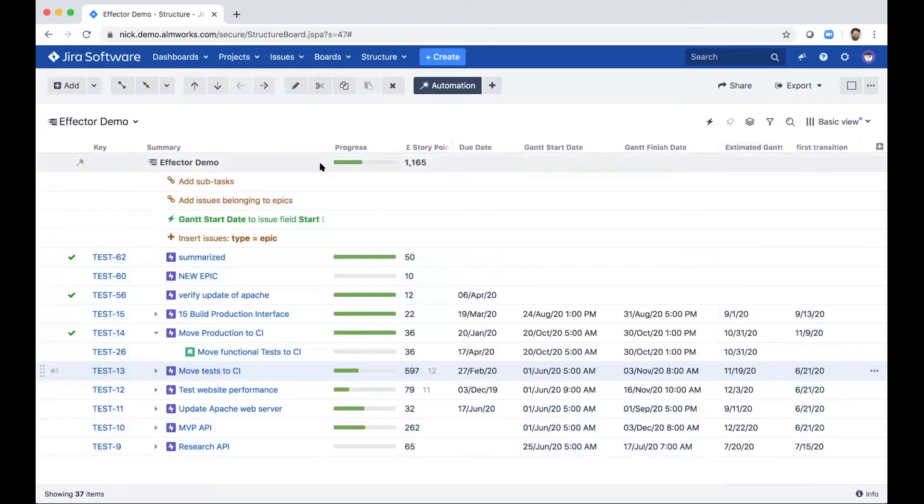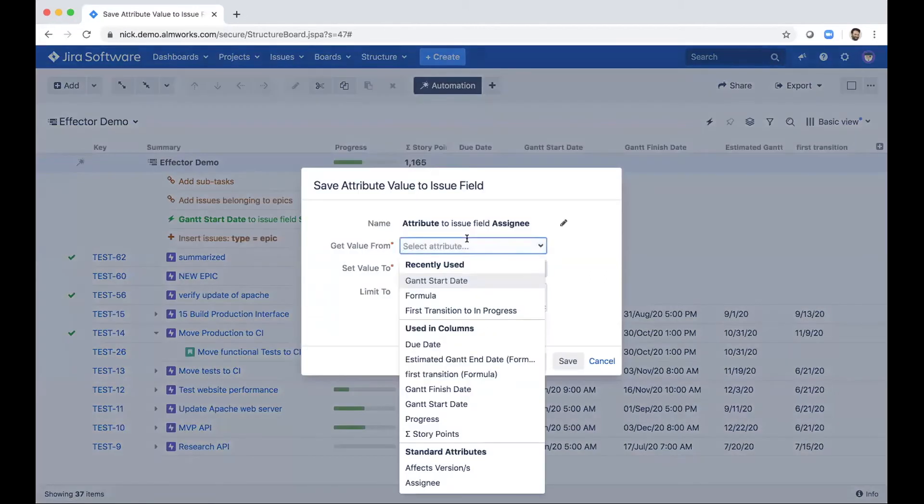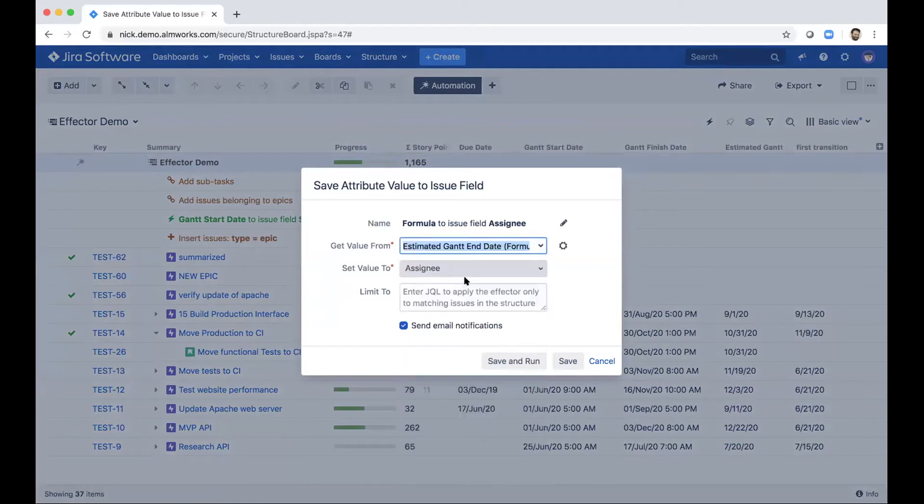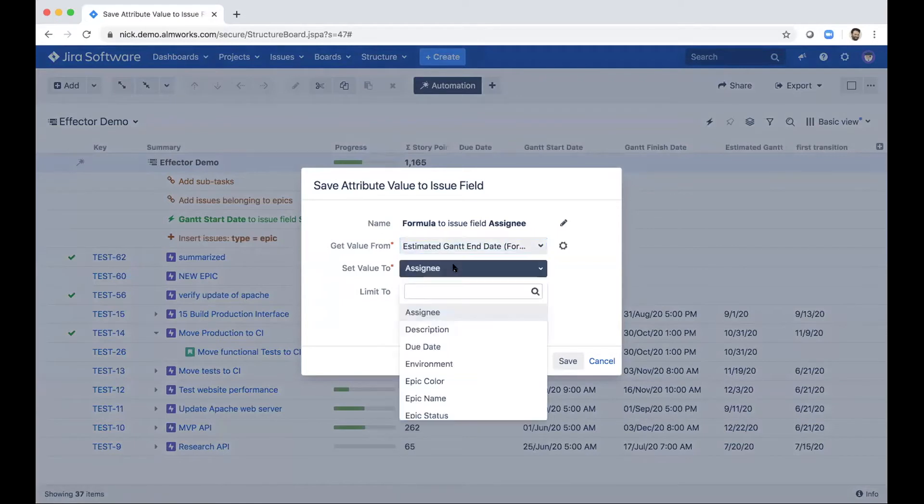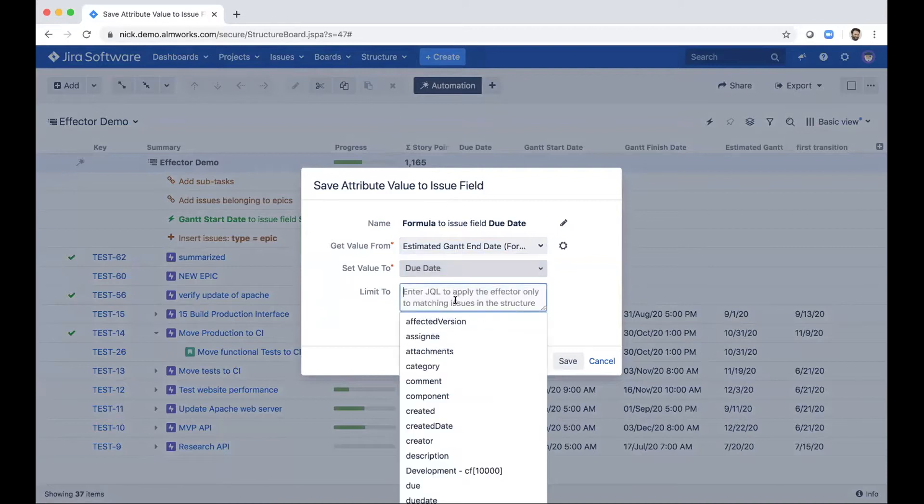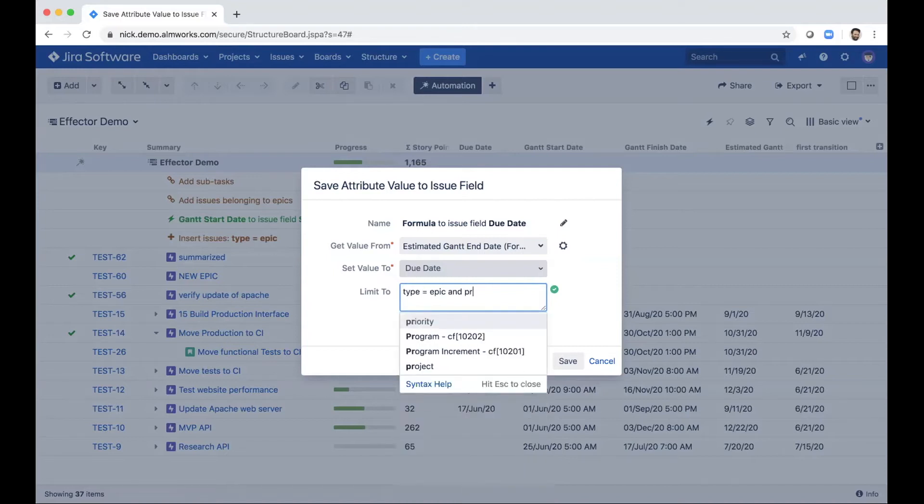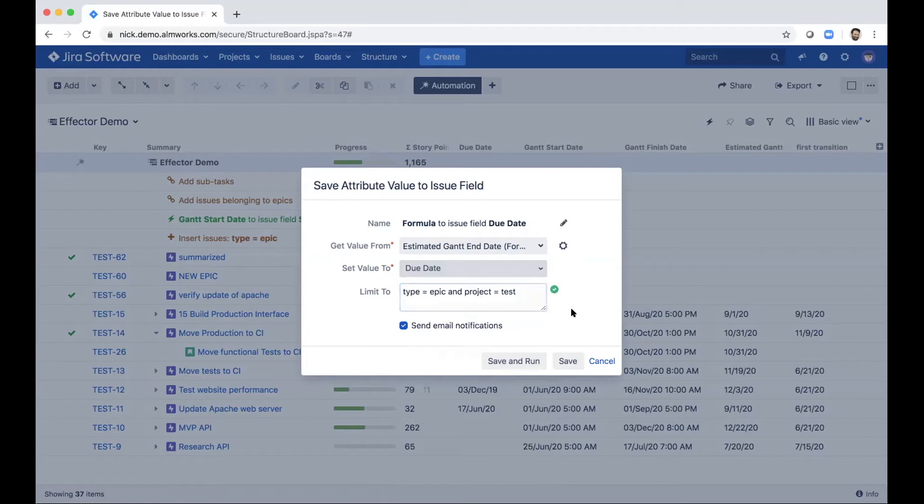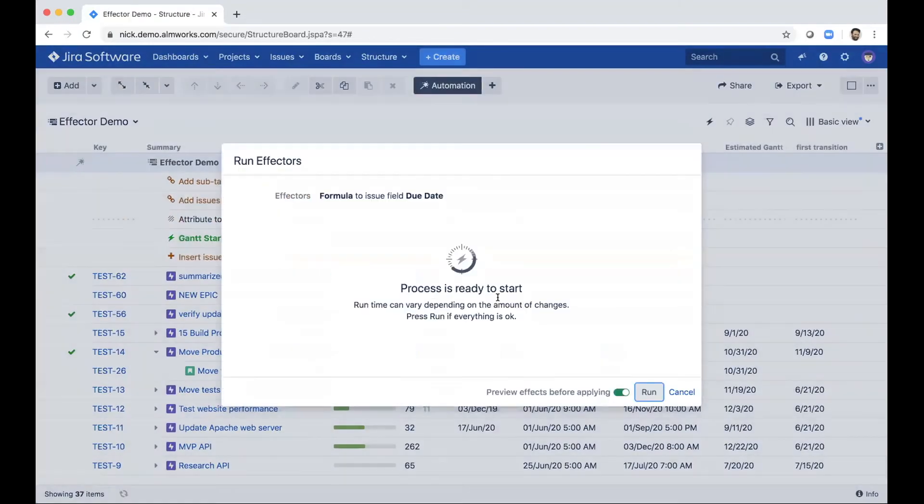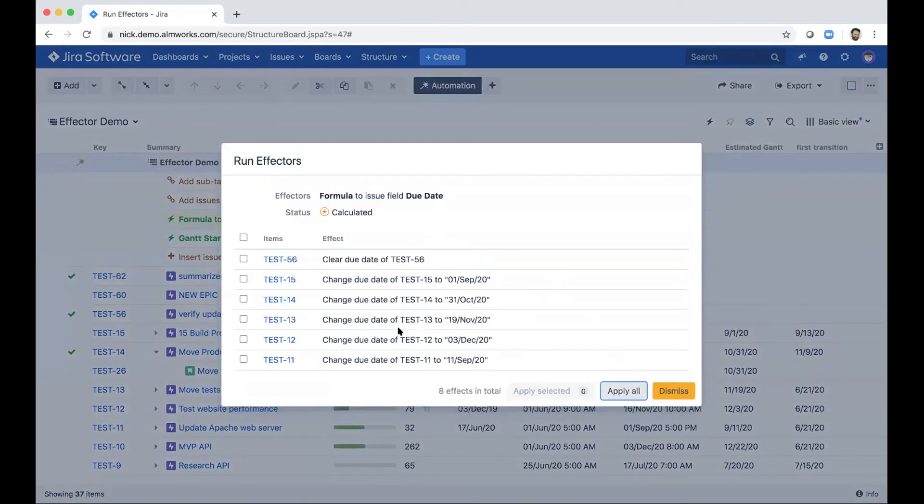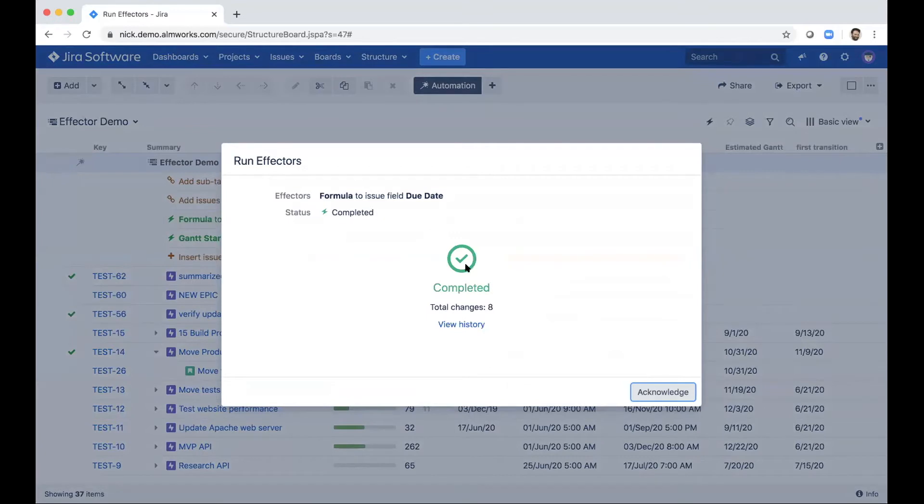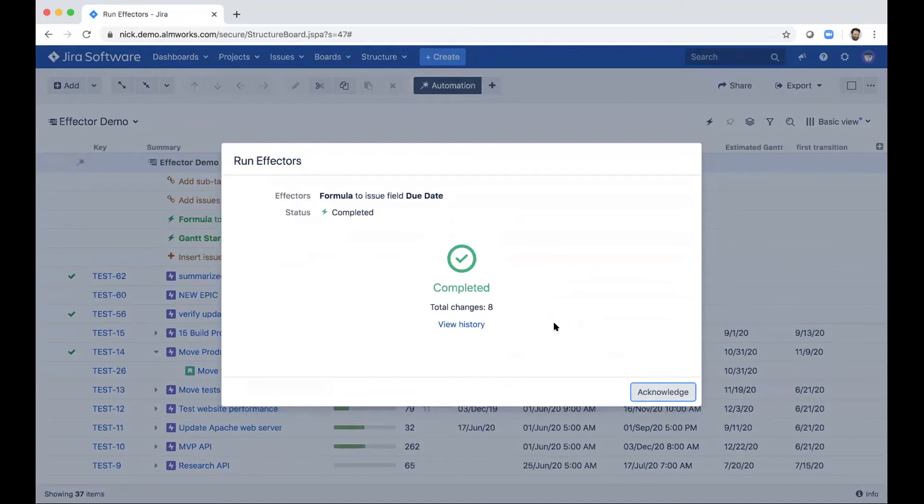So I can add another effector and copy my estimated Gantt end date over to my due date field. And again, I want to limit this just to my epics in this project. And it looks like we've got seven issues again, and I'll apply it. So now eight issues. So this is kind of the idea. We want to take information from structure and make it actionable elsewhere.